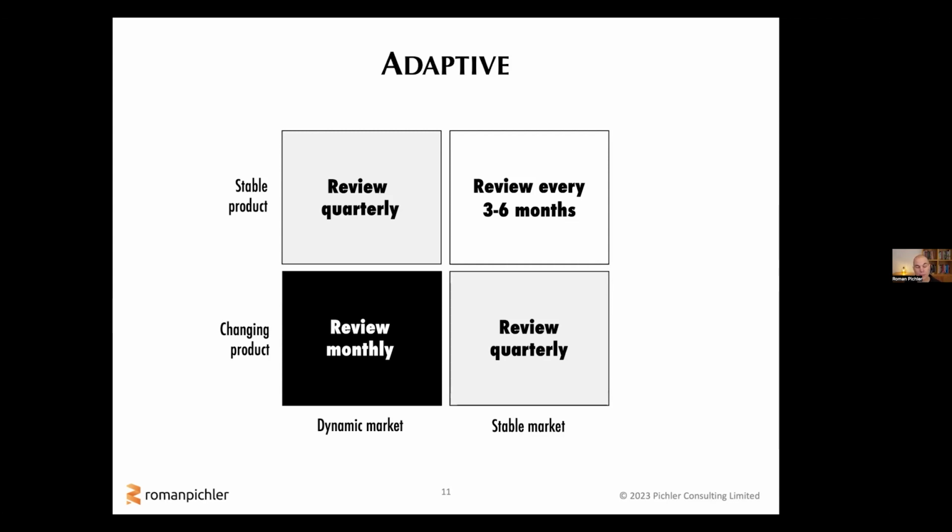So, in Scrum, hopefully we're used to a fortnightly, a 2-weekly inspect and adapt cycle based on our sprints, right? We state the sprint goal and then work is done in order to achieve that sprint goal. We have a product increment available. We put it in front of the right people and listen to their feedback and figure out if we've reached the sprint goal or not. And that allows us then to inspect and adapt. It allows us to adapt our product backlog and adapt the product, change the product.